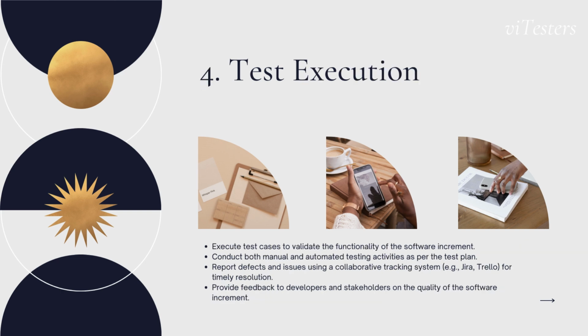Test execution. The testing phase was started once the development team was done with the implementation of planned new stories and bug fixes of the previous stories. The impact analysis was done first to identify the impact of new stories and bug fixes. Once the development team gave the impact areas, the QA team used to discuss it with them. This was done as a best practice to ensure that all the teams were on the same understanding and to avoid missing anything.